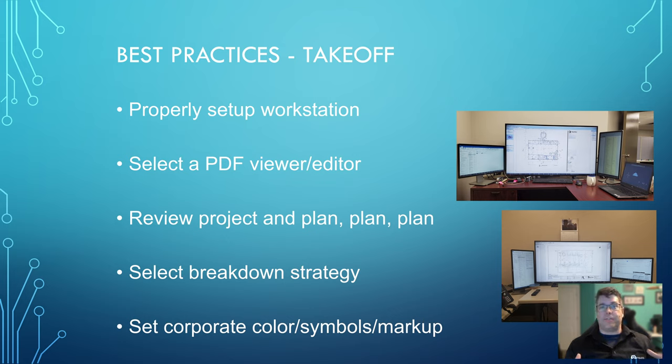I was always an advocate for putting all the breakdowns in. If the platform you were using had an option for that breakdown, we would use it. It would seem, at least initially, like this was extra wasted effort. But the one day that the owner comes back and says, I need to see this a bit of a different way, and it doesn't matter what the reason is, usually it's because something's over budget, you can generate that breakdown in minutes instead of hours and days having to go back and reevaluate everything. So always put as much in your breakdowns as you possibly can.